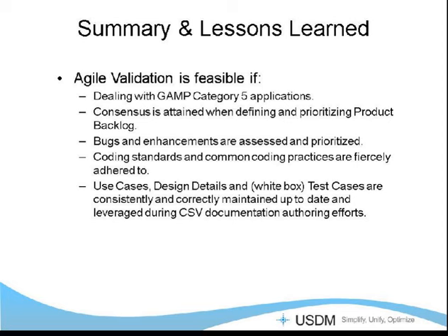literally right before we started to do the validation testing, the requirements document had still not been signed. And so we waited until the end. We signed the requirements document, we signed the design document, and we signed all of the test cases essentially at the same time, within a couple of days of each other.